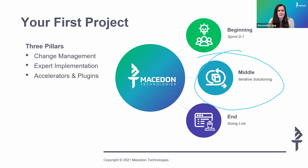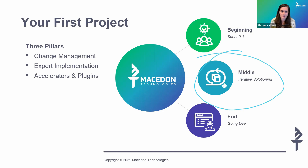Next is establishing metrics for your project before you actually go live. You need to figure out what you want to see at a quantitative level — once this project is live for three months, six months, or a year, what kind of return do you want to get? And how are you going to say that you're actually seeing it? In addition to having those metrics — whether you're reducing 20 business hours a month across a team — you need to assign ownership to that metric. Make sure there is someone at the company accountable for this direct result and then build a plan around it. Build a contingency plan: if this metric isn't met, here's what we're going to do. It's not just having the metric, but having the ownership of the metric that will help the value actually be realized.